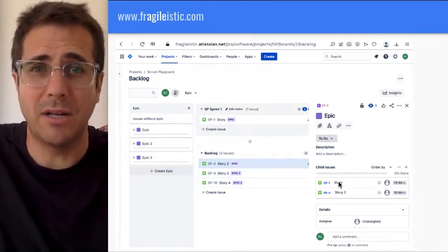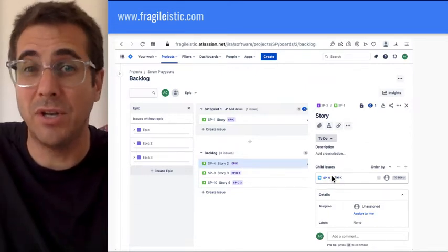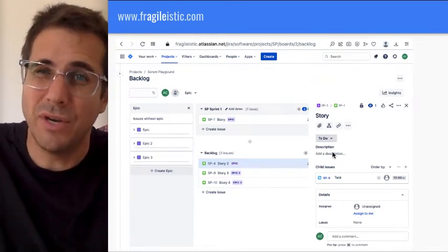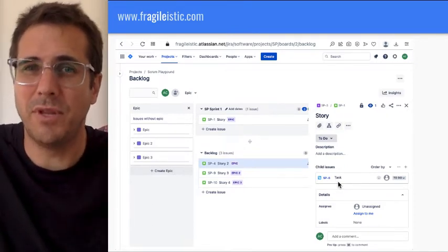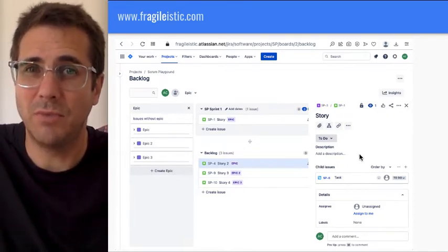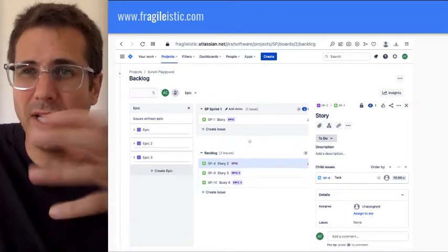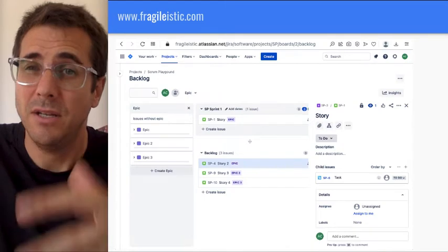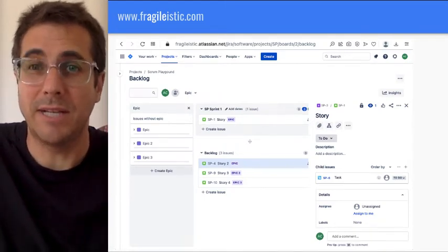So if we're here, we click on the story, and that allows us to refine the story. Then you would start to say, well, how are we going to do that? What tasks are we going to do? You take the story into the sprint and do that. You wouldn't go to that detail. That's just in time, and the progressive elaboration doesn't need to be done. It's once it's in the sprint. Certainly if you've got an experienced team. If your team haven't got really an idea of how they're going to do it, you might want to do that in advance to make sure it can be done in a sprint. Okay, so that's all done before the sprint.